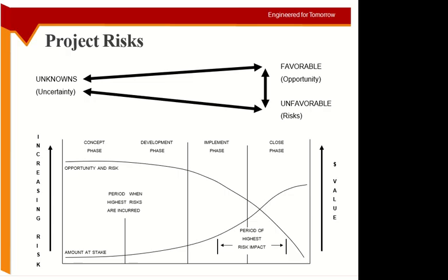So the impact is very low. You are just thinking about it, you may have done some meetings, you may have prepared some sketches. So even if something has changed, you will redo it, it will not cost you that much. But because you are at the initial stage, there are more chances that something unforeseen can happen.